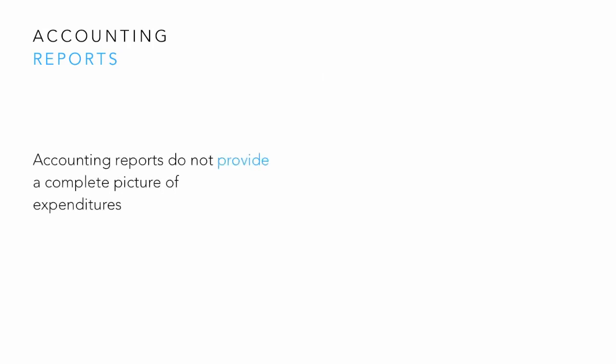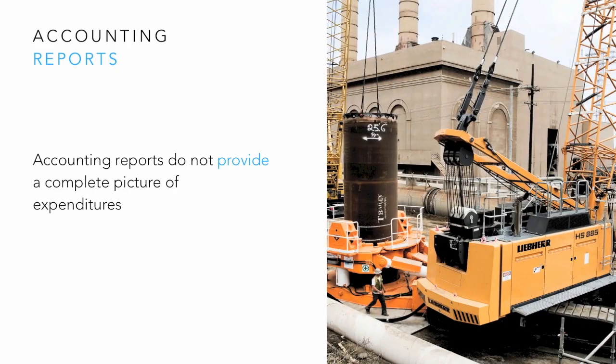Accounting reports do not provide a complete picture of expenditures. Accounting reports typically report only on invoices paid. They do not report invoices that are either yet to be received or billed but not paid. This does not give you the vision to proactively manage spending.